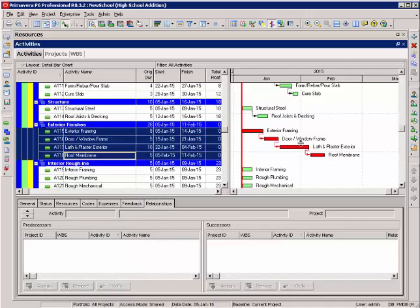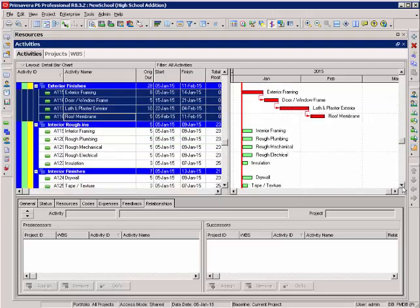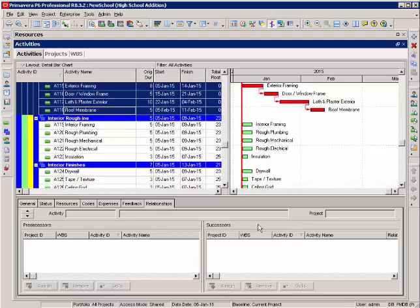So the first way to add relationships is using the linking tool. The second way is to edit link activities. Now I have my relationships tab selected on the bottom and that shows me my predecessors on the left, my successors on the right.